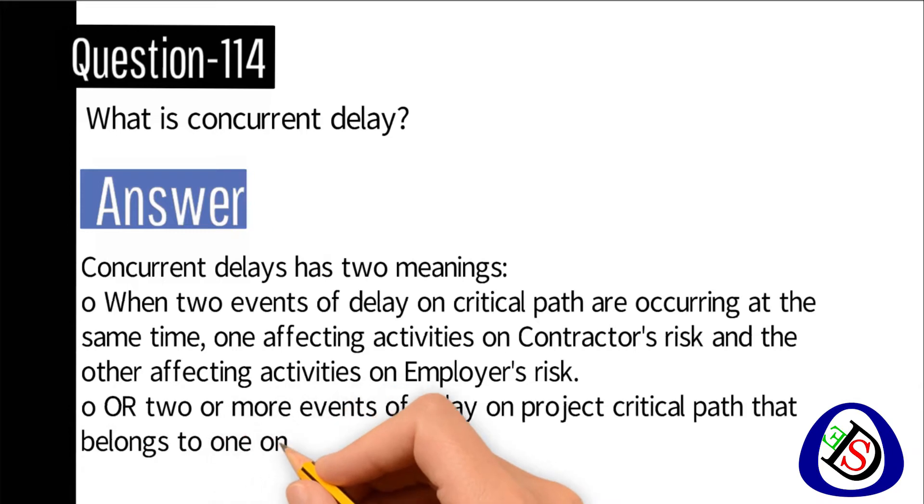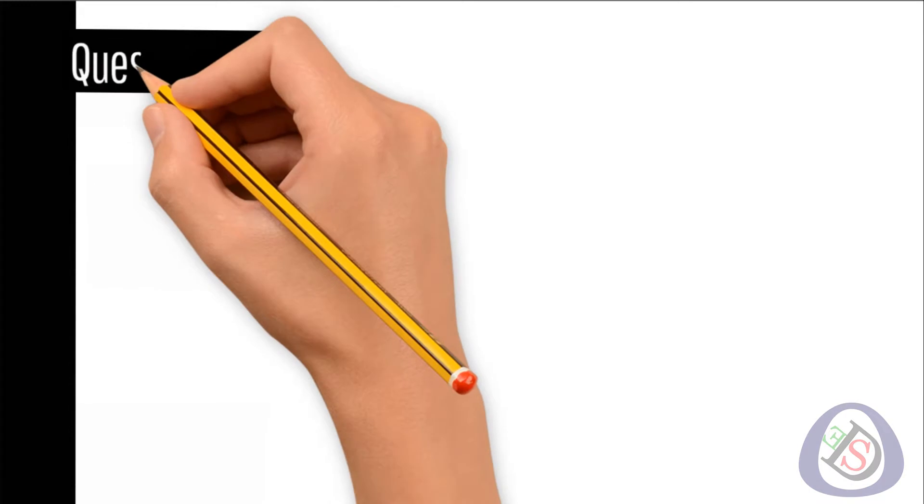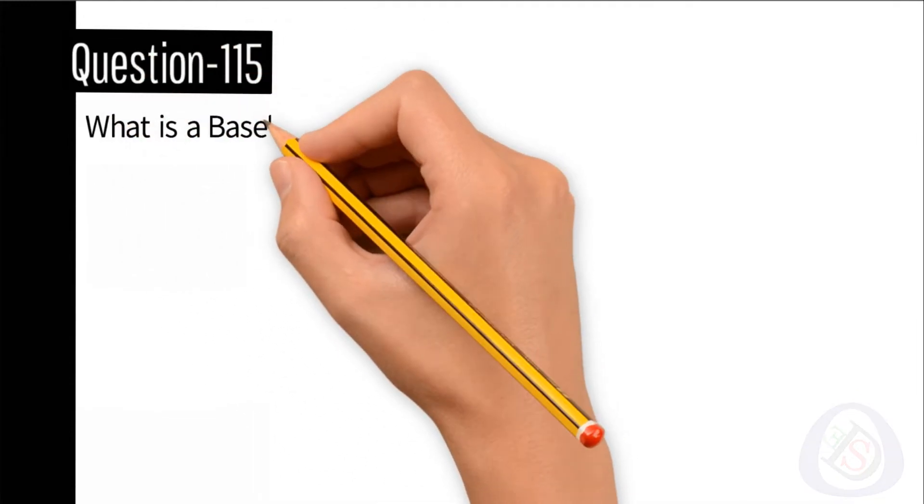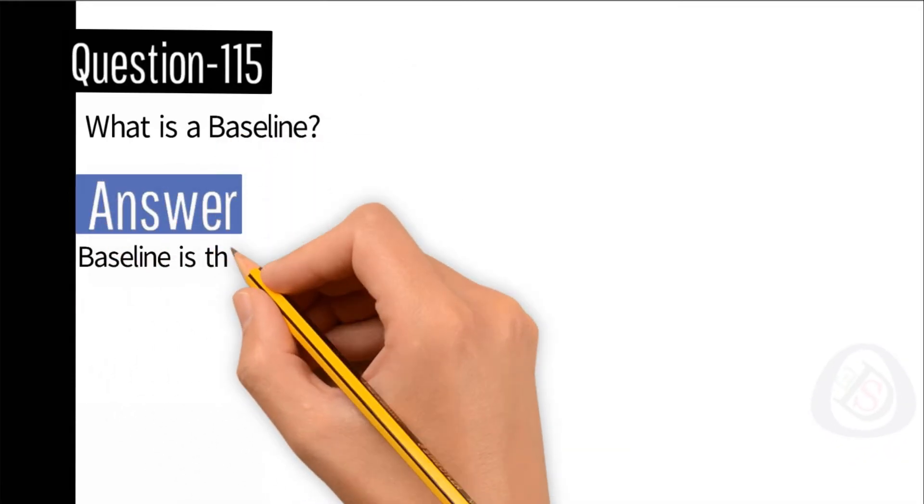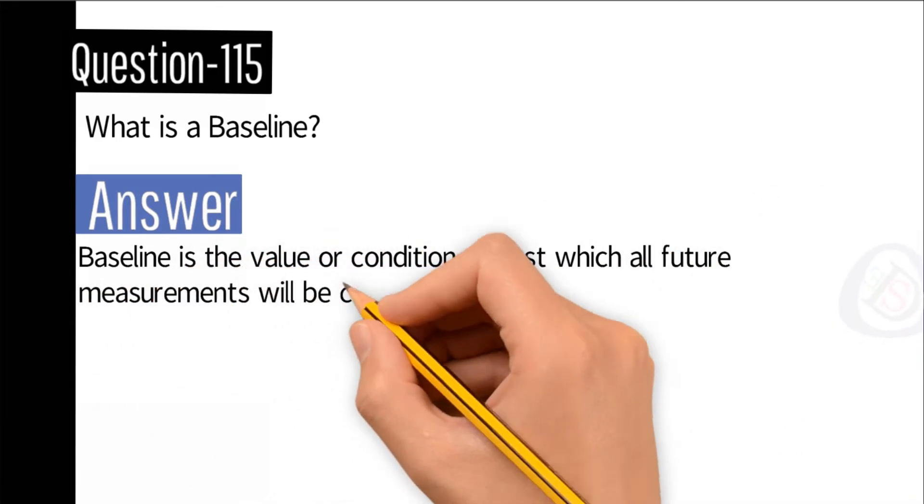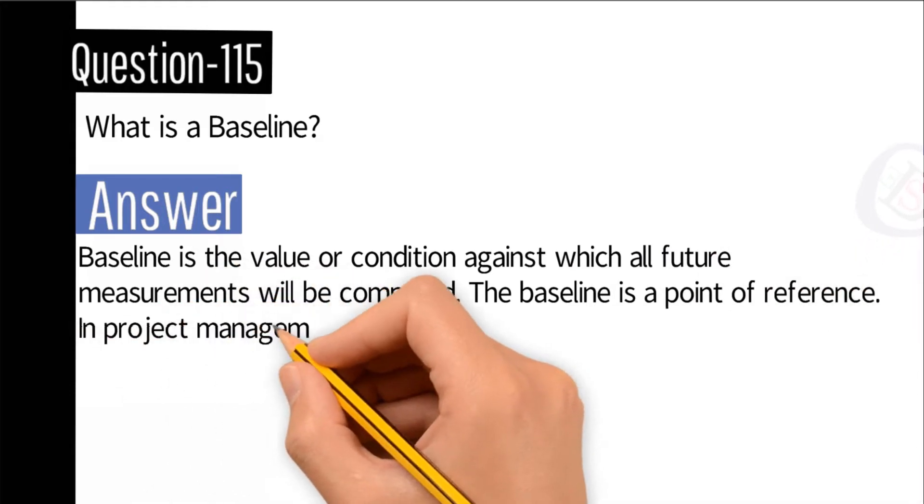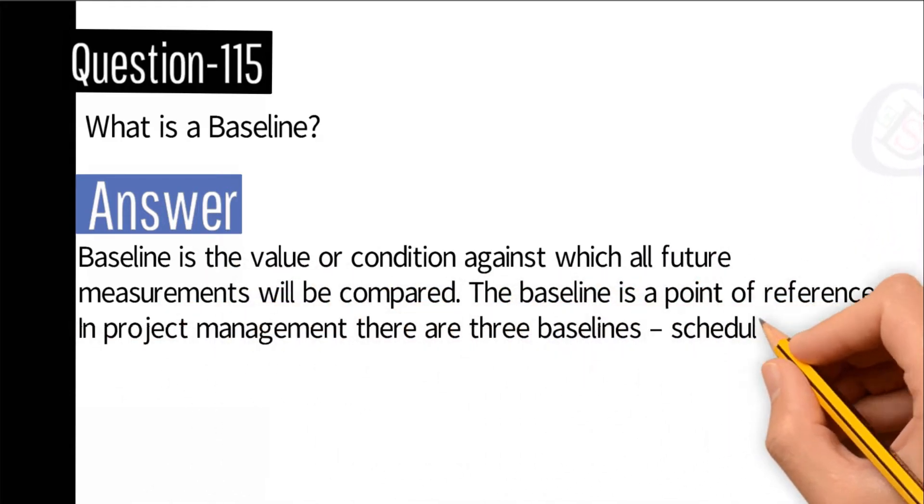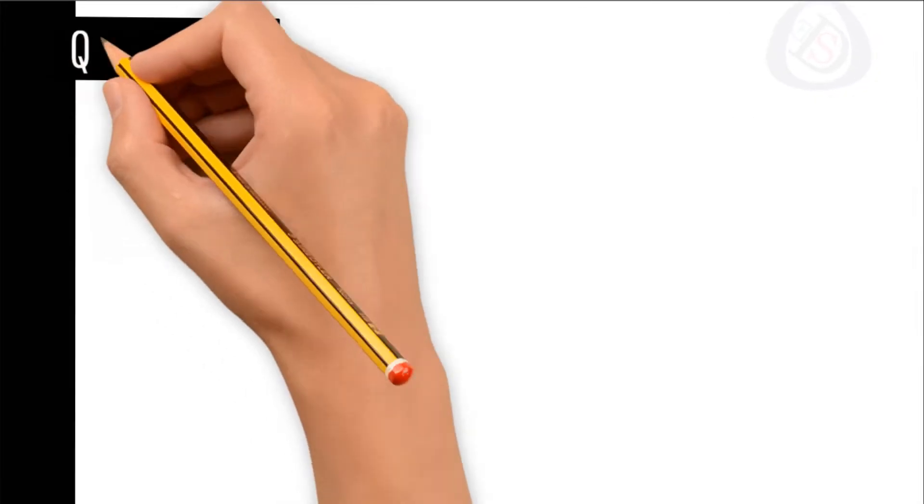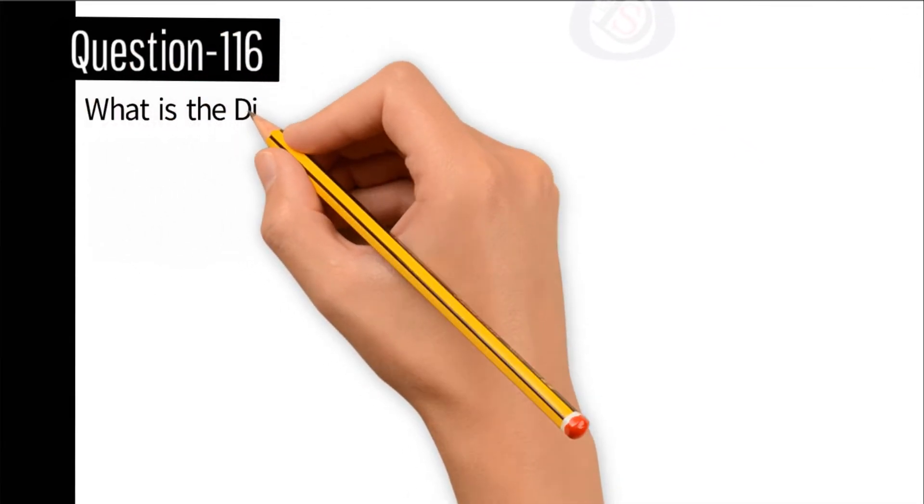Question number 115: What is a baseline? Answer: Baseline is the value or condition against which all future measurements will be compared. The baseline is a point of reference. In project management, there are three baselines: schedule baseline, cost baseline, and scope baseline.